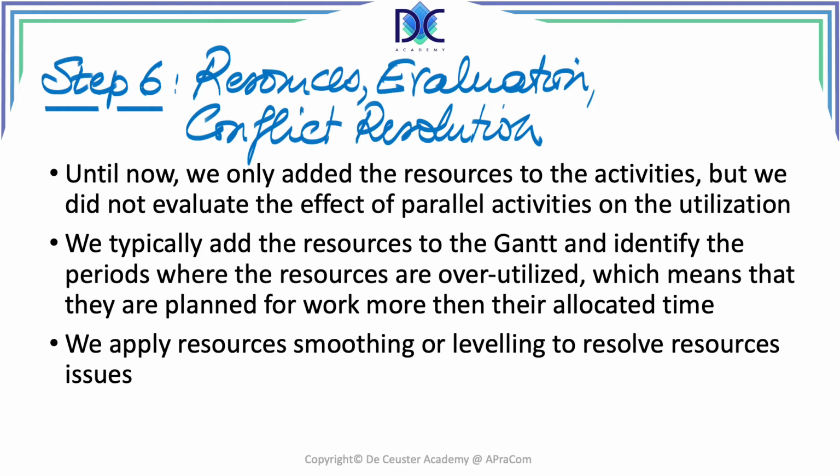When we smooth the resources, we will not add extra time to the duration of the project. On the other hand, when we are leveling, we will have an extension of the project duration. Basically two possibilities are there.